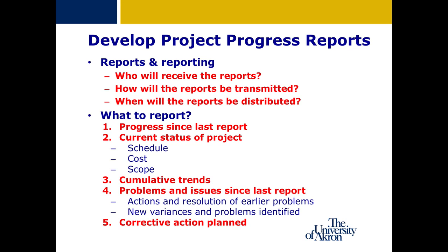Executive leadership should receive status reports noting the overall status of the project budget and schedule, along with any significant project issues requiring their attention or approval. Project team members will want to know their status on individual tasks as well as any delays in tasks that immediately precede their own. I typically provide a written and oral weekly status report and weekly status meeting for the project team, and a monthly project update for executive leadership.